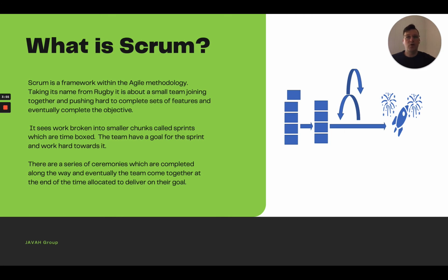So what went well? What didn't go so well? What should we try better in the next one? And then feed that into the next one. You just keep going through these cycles where you pick up a chunk of work, you set the goal, you keep checking in the whole way along, you deliver, you decide, did it go well? Did it not? What should we do next time? You take those learnings and you grab the next chunk of work and you bring that in and you go again. And you just keep going and going and going until such time as that backlog is complete.